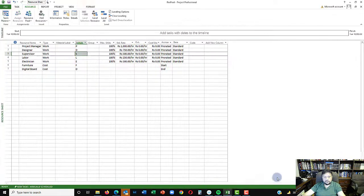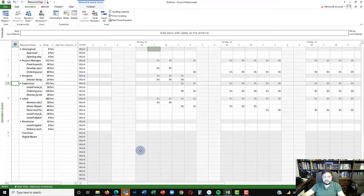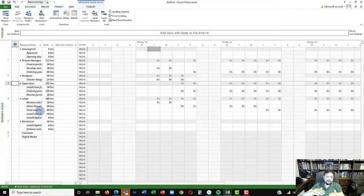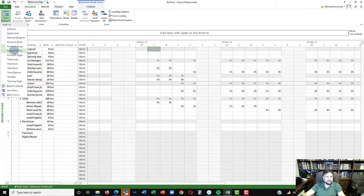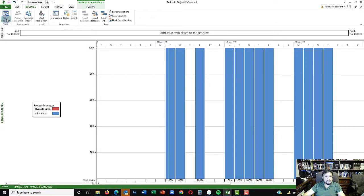Going to the resource pool file, you can see all resource usage consolidated there. The project manager is working on three activities — all reflected here. Designer, supervisor, and labor assignments are all visible. This gives you a consolidated view of what is going on with your resources. Even if a resource has been assigned to multiple projects, they can come to the resource pool and get a composite view of all their assignments, including a histogram view.